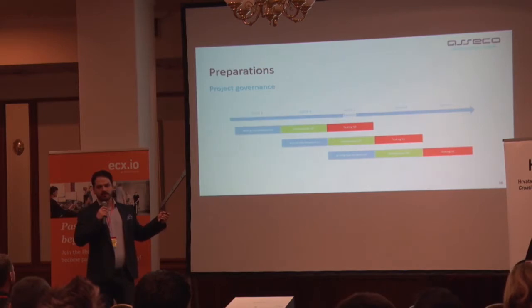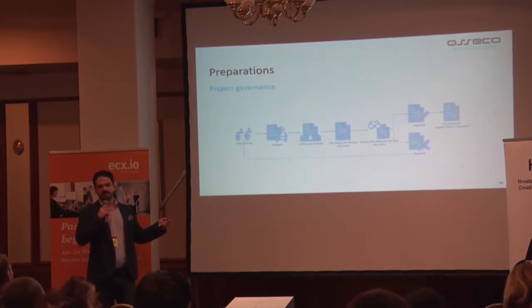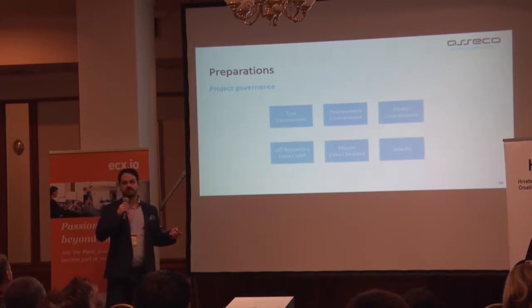At one time and one sprint, software architects are writing specification, testers are testing, and developers are developing. So using a parallelism. You need to write down documentation, how you're going to write it, versioning, everything. And environments, you have to list it before you start. Because if you start, it's going to be hell. Nobody's going to know what's going on.